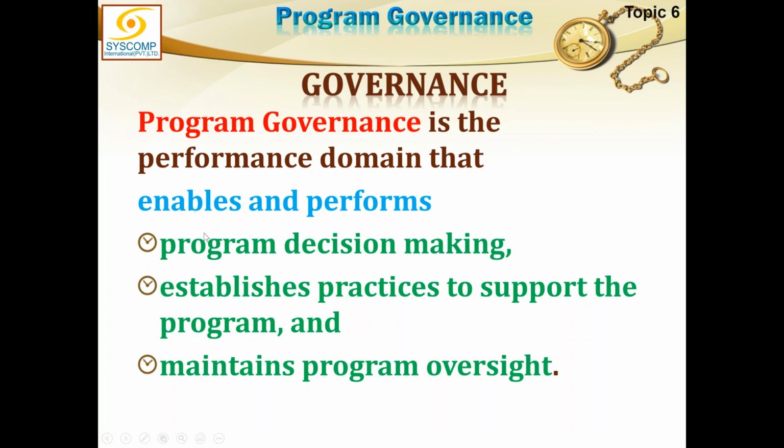Next, it establishes practices to support the program. Naturally, when we start a program, we have to develop a program management plan. I'm not talking about the benefit management plan or the charter or all those things which were created earlier, but ultimately the detailed document would be a program management plan, and the program management plan cannot be created until and unless there is a governance structure given to it.